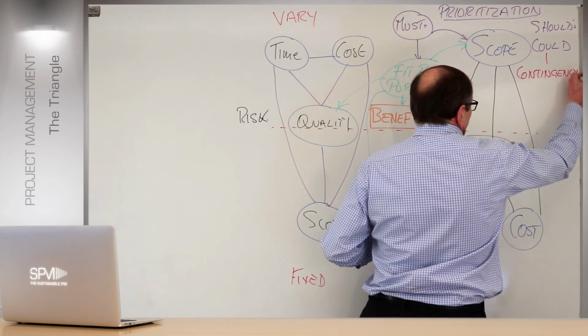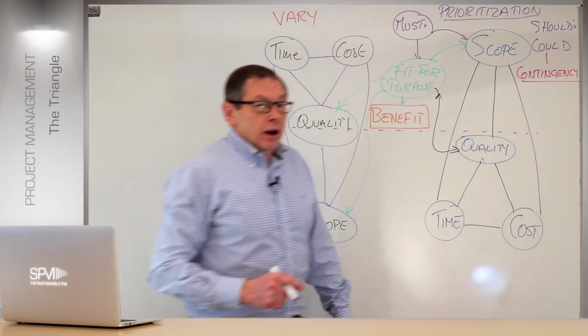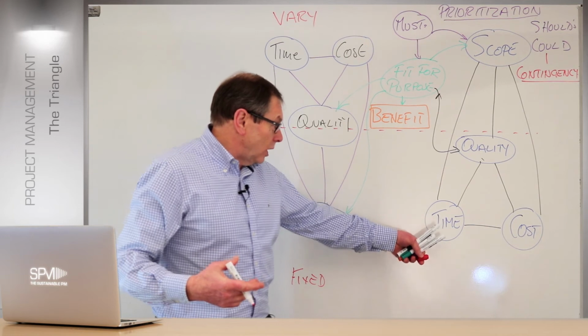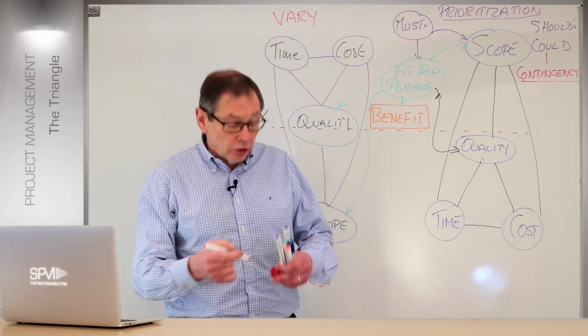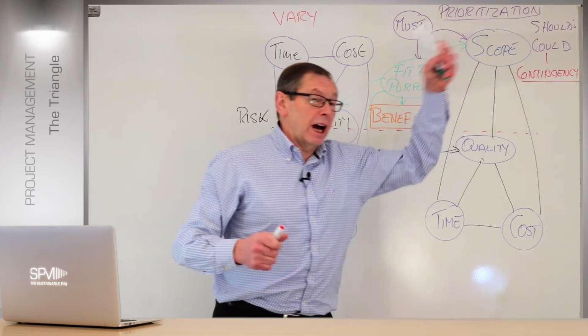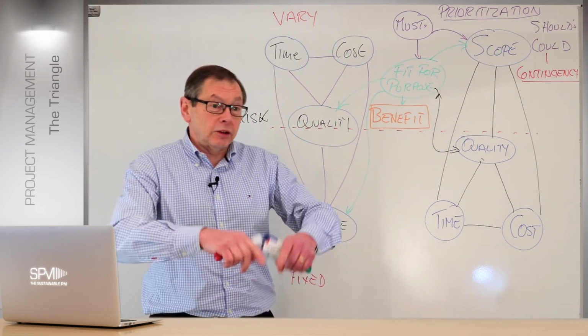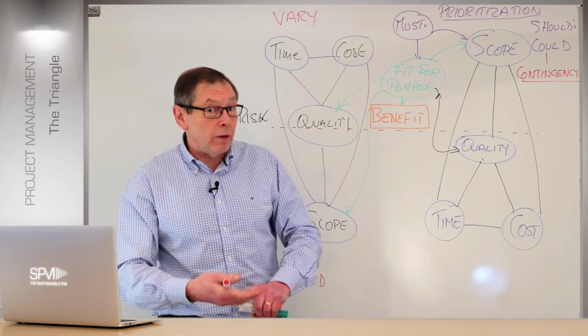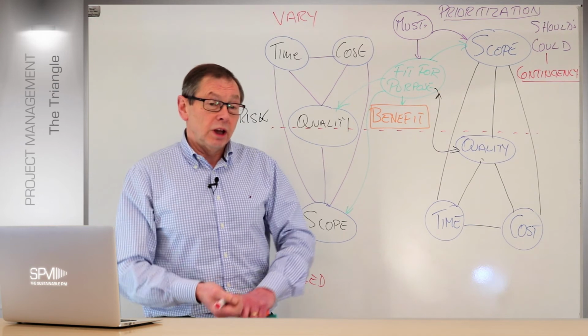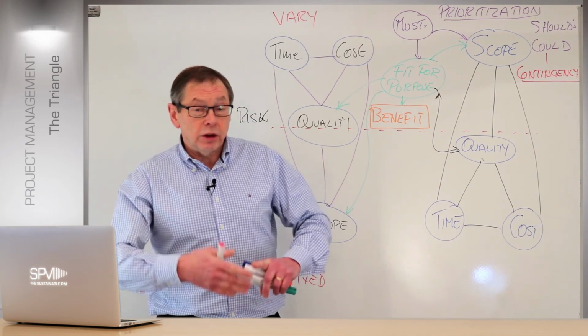And we'll look at that in more detail later. By contingency, that means if I'm running out of time to knock impact on time and cost, and I need more time to deliver certain requirements, I can use my could-haves to give me more space within the time frame I'm using, the time box, or even the work package, but usually we call it the time box. It gives me more time in the time box. It can help me within stages, increments.